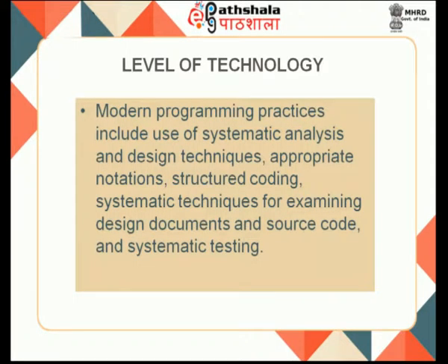And given the same to an expert in programming, there is a good chance that they will be able to build the software and demo it to whoever it might be within 2 months. With 2 months as the completion time, the productivity of the person who has done the code will be 5,000 lines of code per person month. Generally, we will assess the entire document in terms of lines of code, and from these lines of code we will estimate the effort in terms of person months.